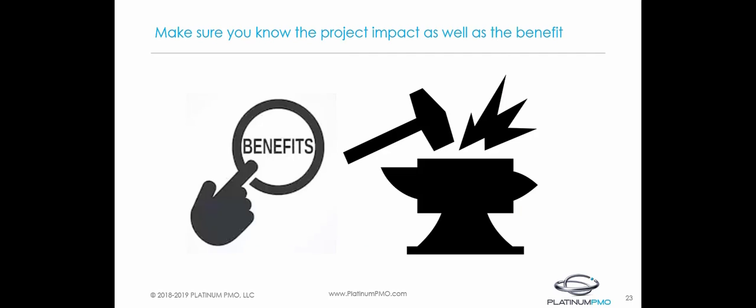Often we receive scope change requests that explain the benefits of the change. When we take this to the sponsor, they will likely say yes since all they see is benefits. They don't see the impact to the program. It is usually the case that the scope change requires more work, and this can lead to an impact on schedule and budget. But don't stop there. Often scope changes can increase program risk. They may have staffing implications. They may impact vendors or procurements. The key is to identify the total impact to your program in all elements of program management.